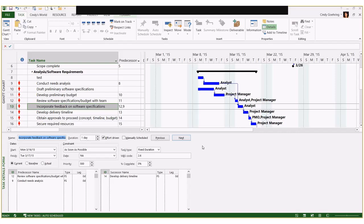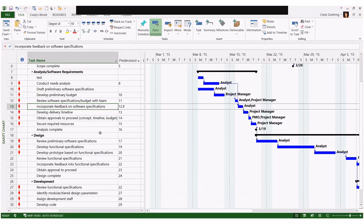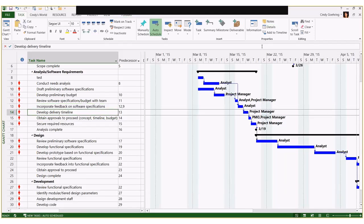I like to right-click in the split screen and change it to Predecessors and Successors, so I can see everything driving a task and everything being driven by it. This is helpful for figuring out why tasks are scheduled when they are and how a change might impact the rest of the schedule. You can also right-click and select Work to see all resources assigned to that task, their units, work assigned, actual work, remaining work, and baseline work — very useful for adjusting individual resource assignments.